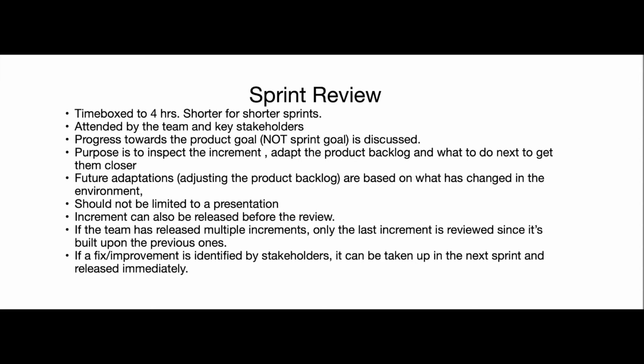It should not be limited to a presentation. An increment can also be released before the sprint review. If the team has released multiple increments, only the last increment is reviewed since it's built upon the previous ones. If a fix or improvement is identified by stakeholders, it can be taken up in the next sprint and released immediately.